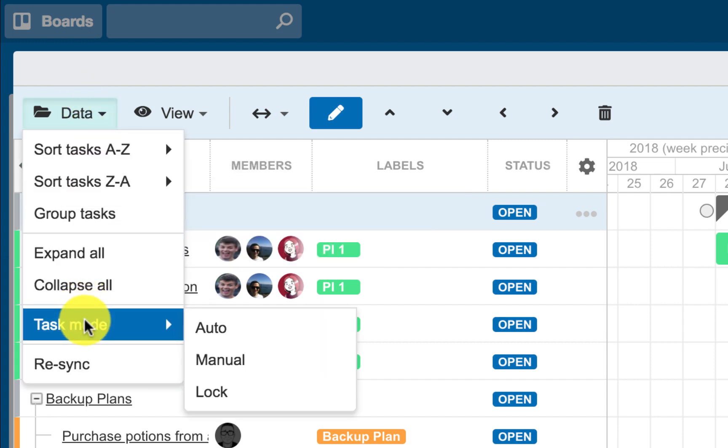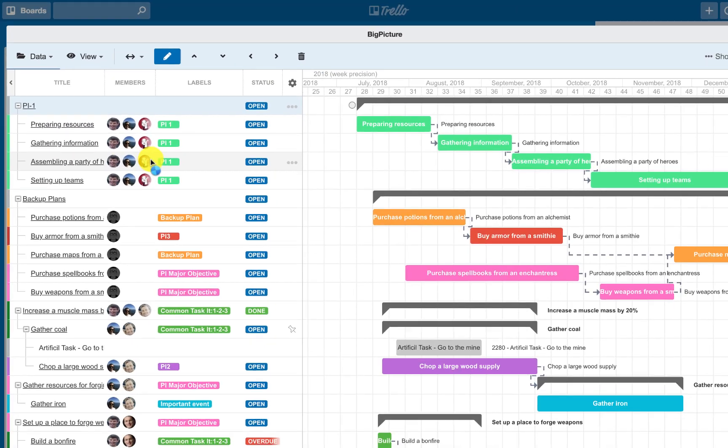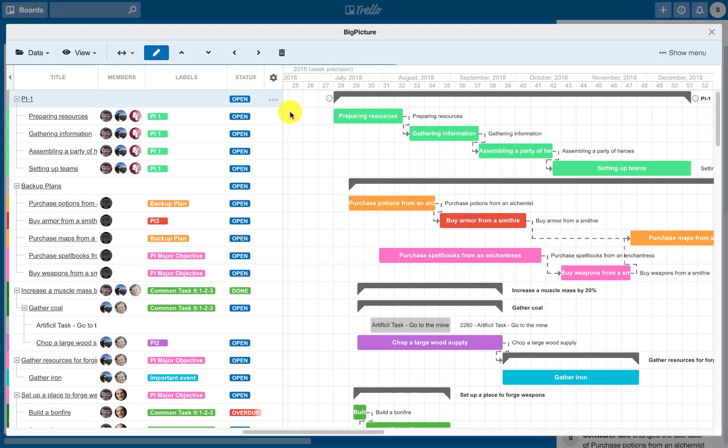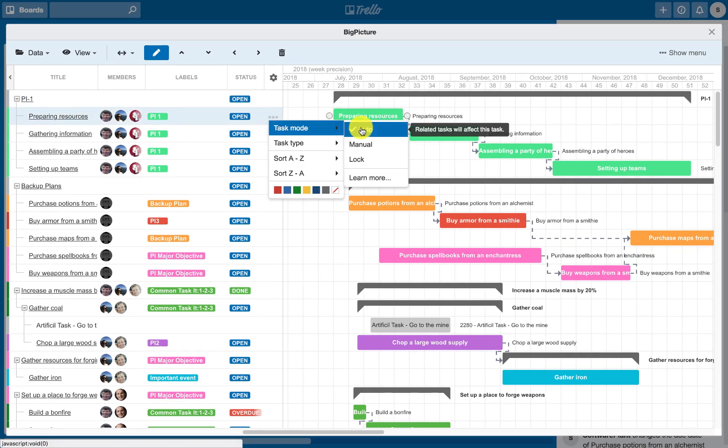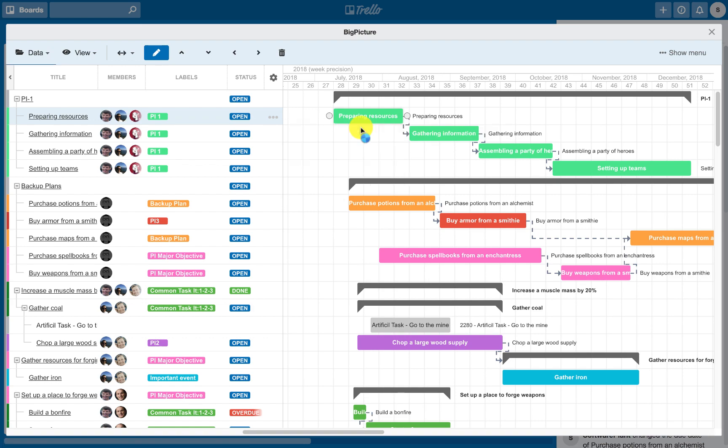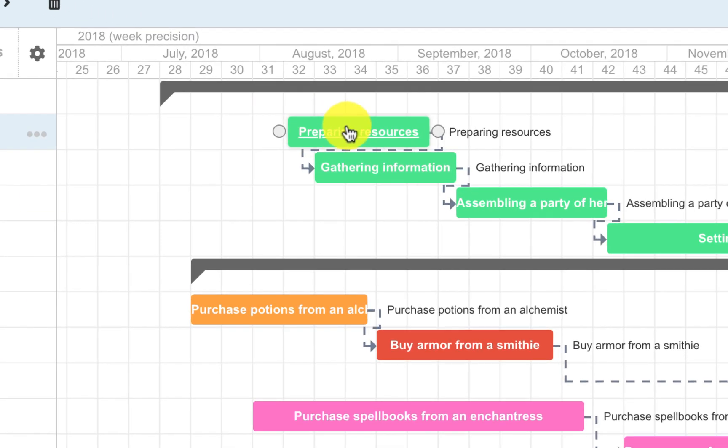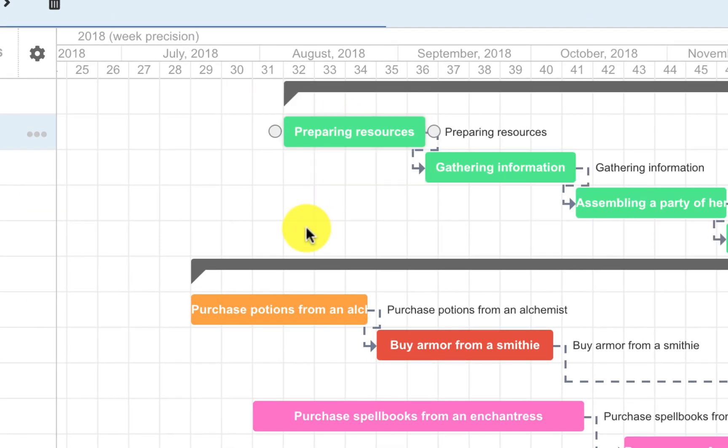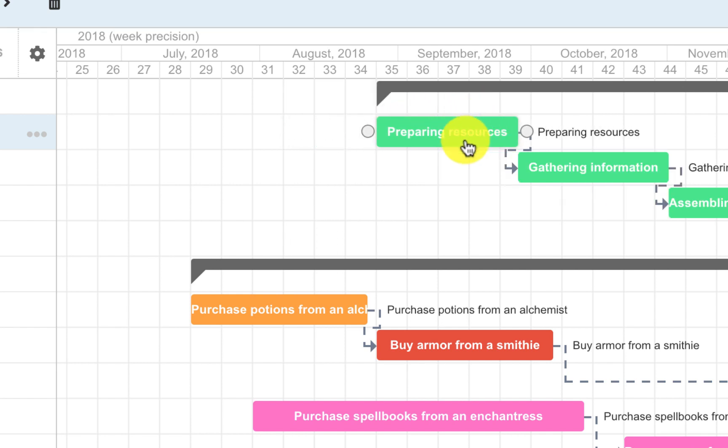Task Modes. There are three modes available: Auto, Manual, and Lock Mode. When Auto Mode is enabled, parent tasks, or the gray bars, will get recalculated and tasks will be adjusted based on the dependency link used.